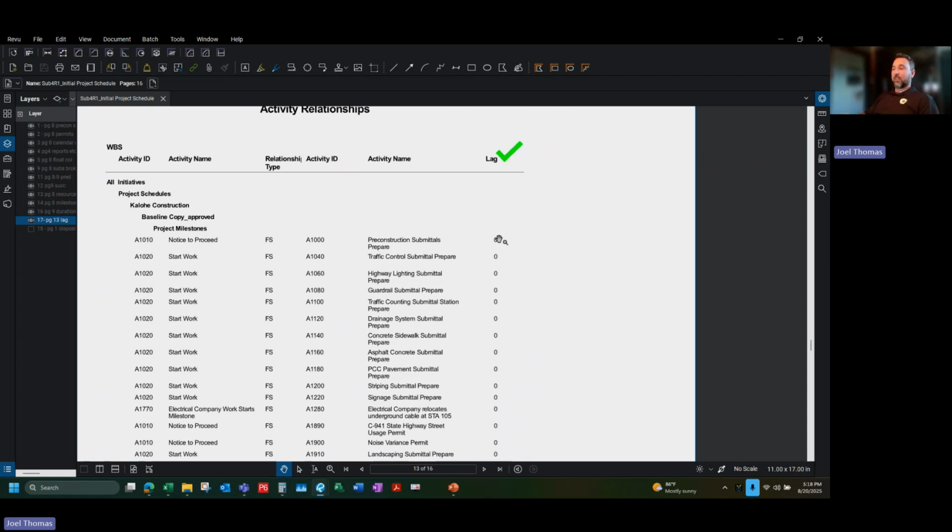And that's why you might get a schedule that all of a sudden has all this delay built in and you didn't know how that happened. You can't figure out what went wrong. There's a chance it might have had a negative lag.